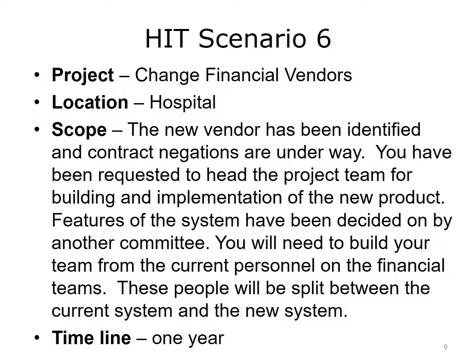In this situation, because you are coming in after the project has started, you will already have an outline of the expected features. You will need to review the requests for information or proposals to understand the features so that you can guide your team in building the system. It is also important to talk with the sponsors and stakeholders to understand their perception of the features and what benefits those features will bring to the hospital.